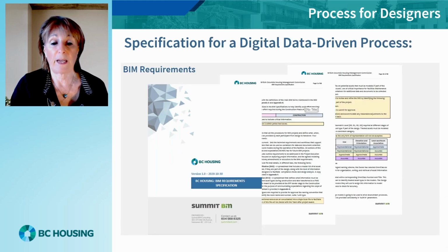From an external perspective, understanding the owner's specifications. These are the BIM requirements on a project set by the owner to establish their specific goals and uses for the data. In ISO 19650 language, the organization's information requirements, the OIR, and the project information requirements, the PIR. This document establishes what it is the owner requires from the process. It is the design and construction teams who determine how they are going to achieve what has been asked for.